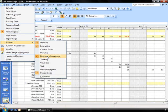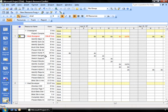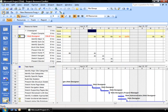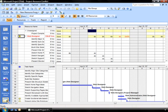So I've already selected it. In doing this, you have a nice view, resource allocation view, that I'm going to select as the very first icon in that toolbar. So I'm going to open that up. And it gives me a nice split screen. It identifies the tasks above. It gives me my resource names, and it identifies the individual tasks below for the resource that I'm looking at.